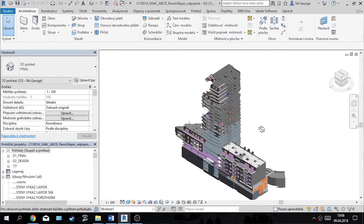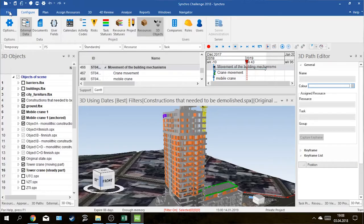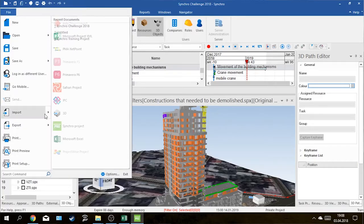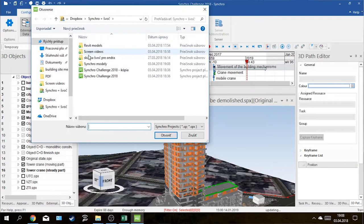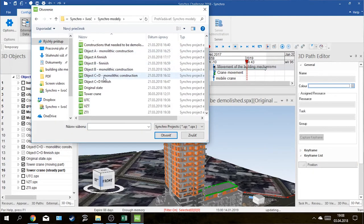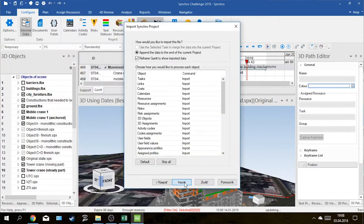We got the model itself in Revit format. After dividing that model into parts that are easier to use in Synchro, we had to export these models. Then we could easily import them into Synchro.